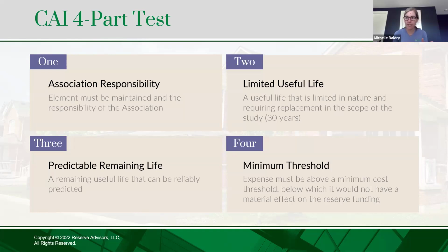A level 3 reserve study is more of a conference call. It's a non-site update where we would just discuss and tweak minor things between those bigger reserve studies, those bigger updates. And then they recently added a level 4 reserve study, which is from plans. Historically, unfortunately, developers would really minimize that reserve contribution to help keep the dues down and help sell units. Then associations would have reserve studies done once when it's transitioned from developer control to board control to get the reserves back on track.